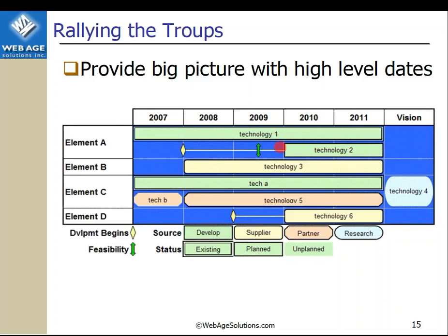And there might be a little bit more detail about certain characteristics, particularly if we don't see it in this one. But if we were to say that element A was providing element B, we could show a link that when we get to this point in element A, you can start this. Notice how we see this timing. Why is this delayed here? It's implied by its delayed start that something else on here had to happen. And that's the kind of conversation you want to evoke by showing a roadmap like this.